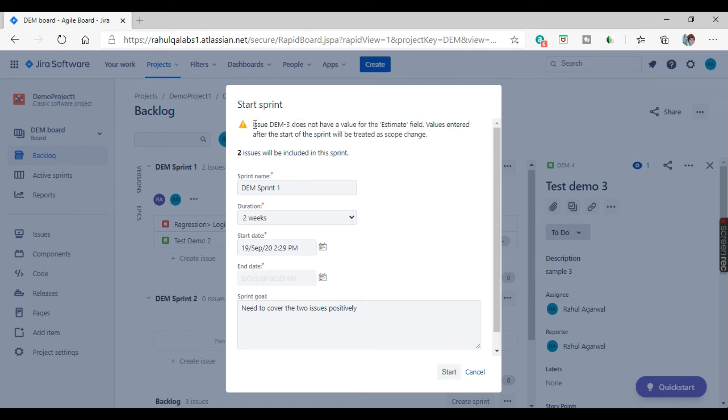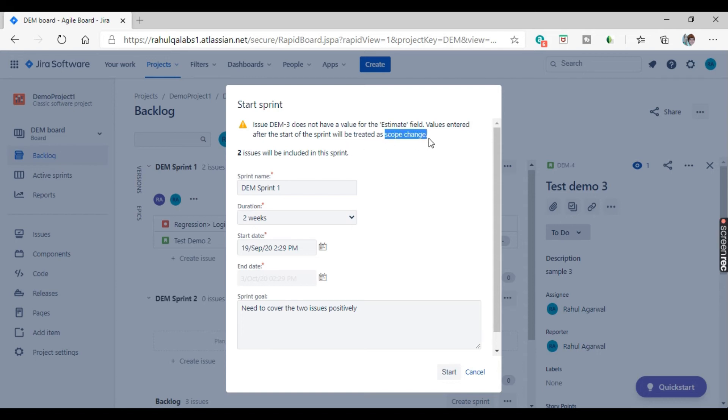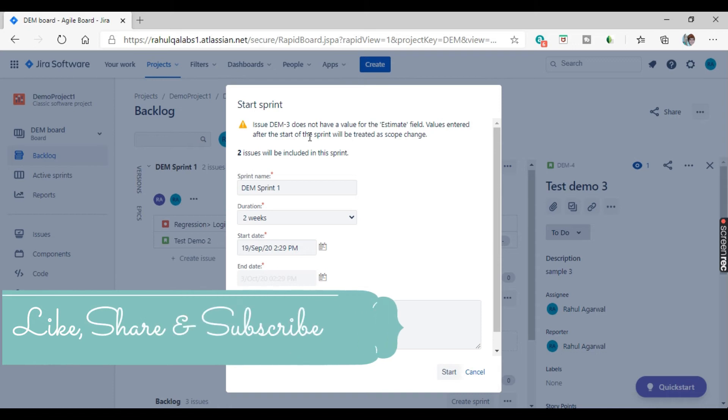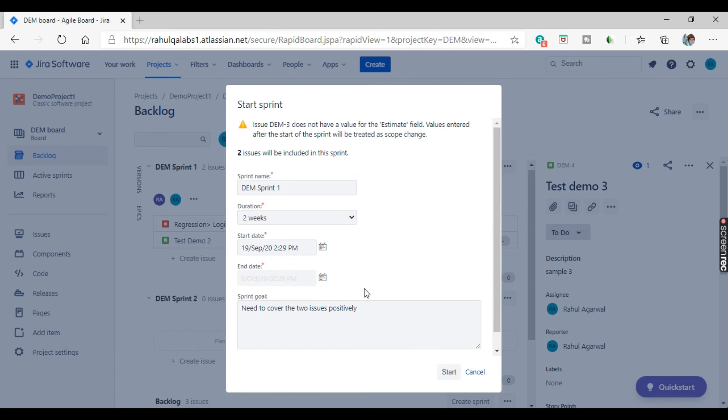There is a small warning out here. Issue DM3 does not have a value for the estimate field. Values entered after the start of the sprint will be treated as scope change. So it is just giving you a small warning that if you change any values after starting the sprint, the scope of the particular sprint may change. So it is better to classify and update all the issues beforehand before assigning it to the sprint. That is the best practice. So just click on start.